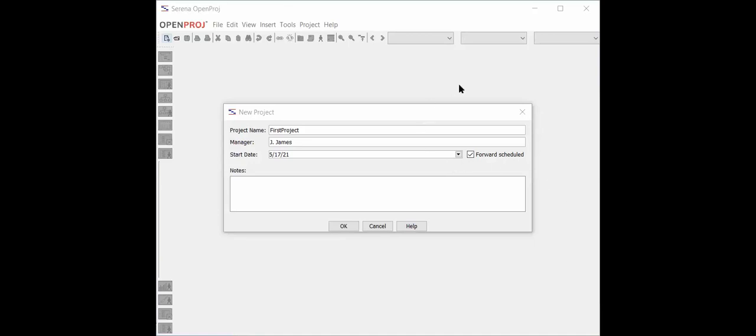That means we are going to continue the project from today onwards, right? So starting date today, or a future date will be there. What will happen when we use this option is the project schedule will be calculated automatically from today onwards, right? Today or the starting date onwards. That's what is going to happen there.